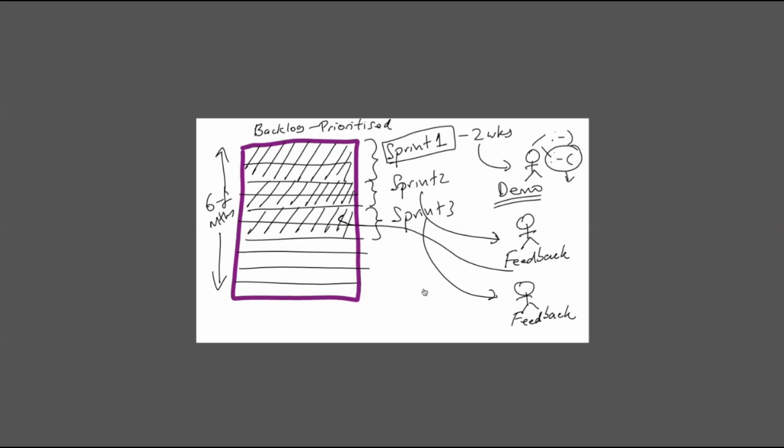Now, let's take another type of project which is probably not so normal. Say we're preparing a proposal, and this is a huge proposal. The proposal itself takes 2 months, right? So if my cycle is 2 weeks, so every week maybe, you can seek alignment between your stakeholders that you're doing the proposal correctly. And that input is for you to correct it, as opposed to waiting for 1 month and then showing work, by which time the change would have been so much that you find yourself thinking, if I had known this earlier, would that be nice? So that's the idea, right?